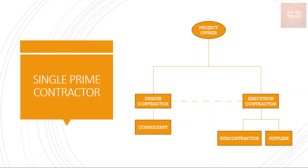The first and most often used arrangement is called the Single Prime Contractor. Under this arrangement, the owner will first contract with a design professional or design contractor to perform the requisite planning and design works. The design contractor can utilize specialized consultant help to carry out the designing of some specialized works. Once the design is completed, the owner then contracts with a single contractor to carry out the execution part of the project. All procurement and subcontractors come under this single prime contractor, which insulates the owner to a limited extent from claims or disputes arising from these suppliers or subcontractors.